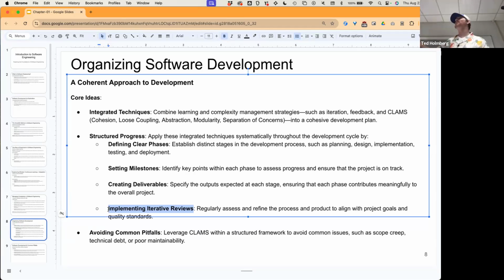If one team treats it as one thing and another treats it as the other, that's going to induce a large amount of technical debt where you have to go back and refactor whatever assumption was missed. And I only say that because I have seen teams in the professional landscape where that's actually happened. They made assumptions on something as simple as an ID, and then all of a sudden you had weeks more work to refactor what an ID was. Simple clarification added weeks more of implementation time. So that's why it's important to constantly be in communication, so that you can catch those things earlier on and not later on.